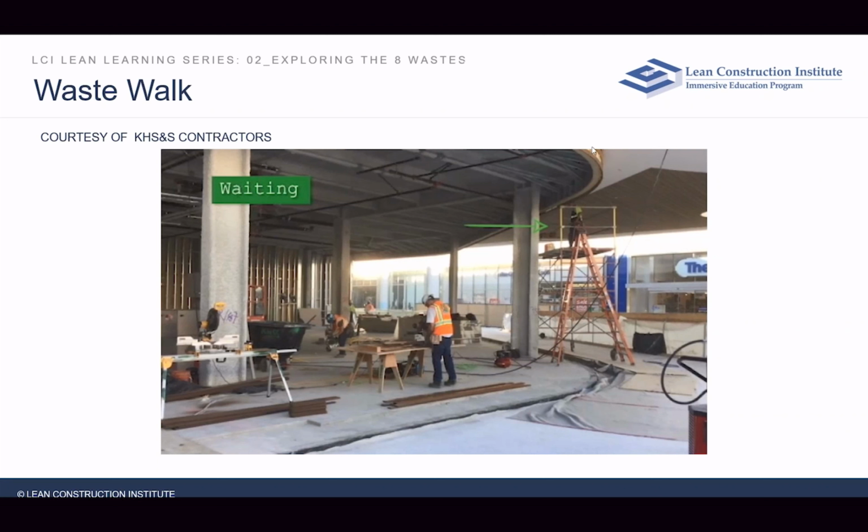We have a project site and we're installing wood along this soffit. We have two workers right now, one up on the scaffold with a ladder next to it, and another worker doing some cutting and measuring. The worker up top is waiting for a piece to be cut and brought to him. He's just standing there doing nothing. By the way, this video runs for 1.5 minutes, and in that time they install one piece of wood.